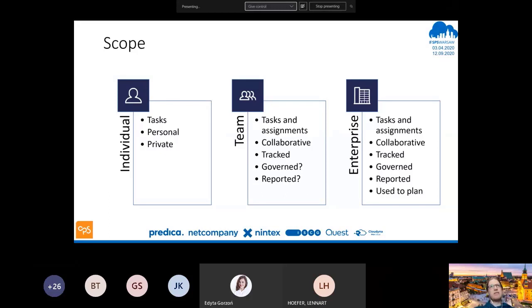That also starts to give us the ability to use more of a Kanban approach of pulling tasks. I'm going to assign a task to myself, and then I'm going to look for other tasks that aren't completed, aren't assigned, and I can assign those to myself. So that starts to make it very much more collaborative. We have visibility of who in our team is actually working on different tasks. Now, we might also start to get into tracking tasks, knowing when they were started, knowing when they were completed, starting to have things like burn down charts to see what our progress is.